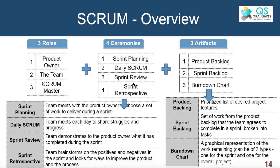There are four major ceremonies in a scrum team. Sprint planning happens on the first day of the sprint. In a sprint planning meeting, the team picks items from the backlog, discusses those items with the product owner, and decides whether to deliver them. They pick only those items from the product backlog which they are comfortable delivering in the current sprint, starting from item number one since the list is in prioritized order.